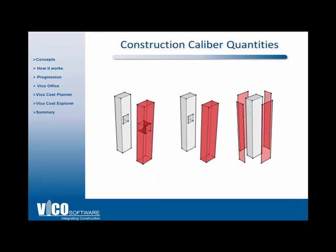Once you start adding more information to the model, that's when you can derive construction caliber quantities that are more accurate than just regular BIM quantities. BIM applications have to be programmed to calculate these accurate quantities, and VICO spent the last five years understanding the best way to calculate them. In this example you can see that for a column you can extract the gross volume, the net volume, and correctly calculated surface areas. As more detail becomes available and those massing elements and zones get replaced with accurate construction components, you can replace your assumptions with real quantities from the model and track the changes in design and cost against your initial assumption.